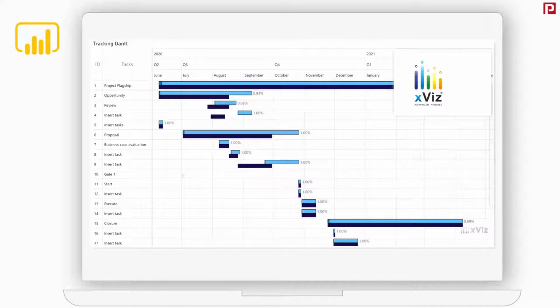But if I go to the very last one, task 7, I can see my deadline is not affected. That is because the tasks up top are not on the critical path, so it doesn't change my finish line. So we're all good still, even though these are not following the baseline. So we want to end up with something like that in regards to baselines, where we can really visually see how the plan is progressing.